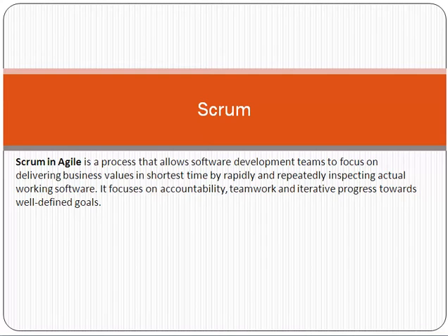Like there are 40 tasks which we have to deliver. So if we use the Scrum approach to develop that e-commerce solution, we divide the project into 4 sprints, and each sprint will have 10 tasks. We take the 10 tasks, plan them, then develop, test, and deploy. Then we take sprint 2, take the next 10 tasks, and plan, develop, test, and deploy them.